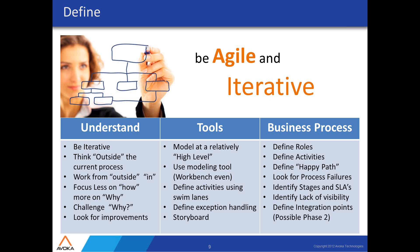As you're mapping these things, generally what comes out first is a happy path — if everything works perfectly, this is where it goes. Many times you'll finish mapping a process with an organization and that's as far as they'll have. In reality, there are all kinds of process failures and exceptions you need to understand because you might be able to automate them. That may be where the big ROI is — stopping things that go wrong can be the things that cost the organization big money, like compliance issues. But if you uncover something very tricky to solve, don't be afraid to say that's phase two.